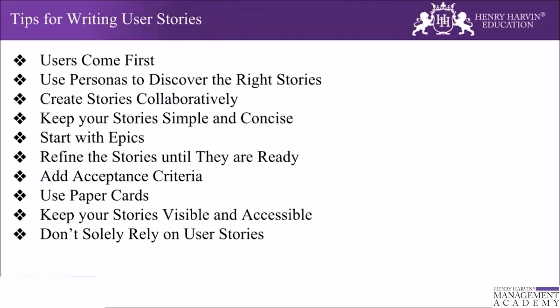You can create stories collaboratively, which we have seen in the previous slide, that all the team members, product owner, or stakeholders should write the story. They are not a specification but a collaboration tool, and the story should never be handed off to a development team. Instead, they should be embedded in a conversation. The product owner and the team should discuss the user story together, and this allows you to capture only a minimum amount of information. It will reduce overhead, and it will accelerate the delivery.